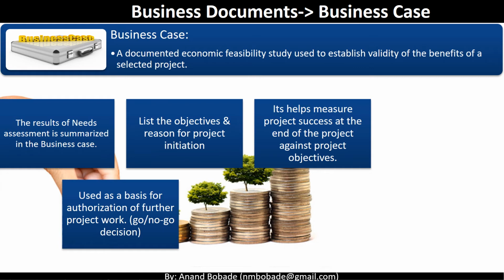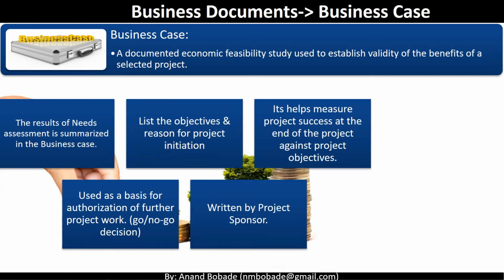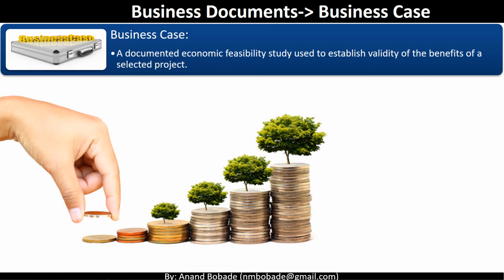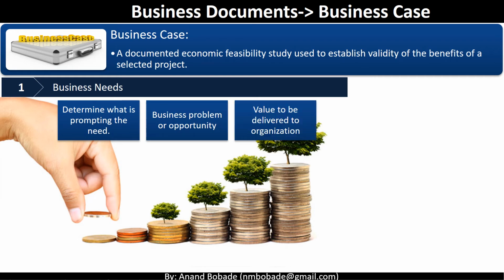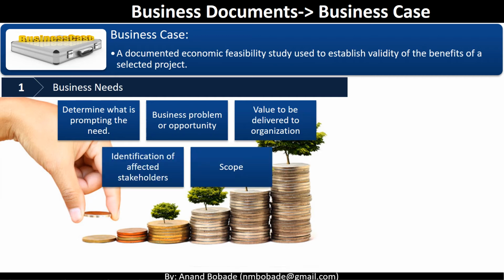And who writes the business case? Of course, it is written by the project sponsor, and remember, not by the project manager. Of course, the project manager can contribute to the business case, but accountability is with the project sponsor. Let's look into the details of the business case. The key component of a business case is business needs. It determines what is prompting the need, business problem or opportunity, value to be delivered to the organization when the business need is fulfilled, identification of affected stakeholders, and finally a scope.